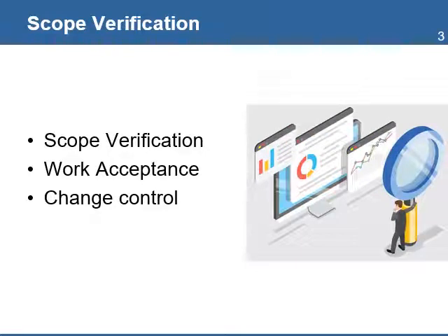Once the work has been assigned and the team is completing the work, the next step is to verify the scope of work. This step includes the actions required to ensure that the work delivered meets the specifications of the project, and it is used as a guarantee that the project is delivering the promised quality in all goods and services provided by the project. The team reports on the completion of activities. The activities are checked against expected standards, and if there are variances, changes are authorized.